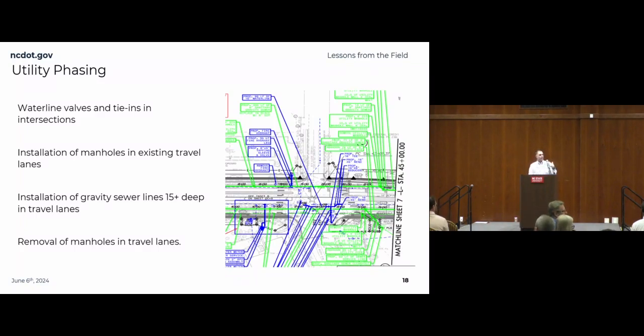Again, we're just piggybacking a lot of the phasing that comes into account when we get some of these plans. We're looking at the CFIs, the 65% plans a lot of times, and all the TMPs and the utility construction, signal plans, et cetera, all start to come in afterwards. As we all review disciplines, if we're not coordinating everything well, it's relying on construction to group it all together. So just anything we can do to help improve it along the way.